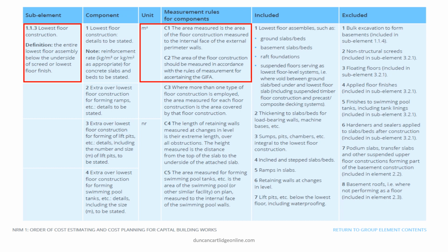The calculation of a cost plan allowance for substructure is in two parts. A cost for the standard foundation, as outlined previously, and, as shown on this page, a cost for the lowest ground floor construction and includes oversite slab, hardcore, damp-proof membranes, etc.